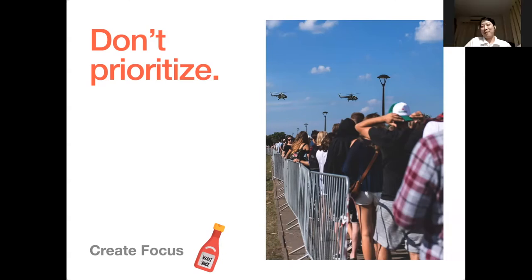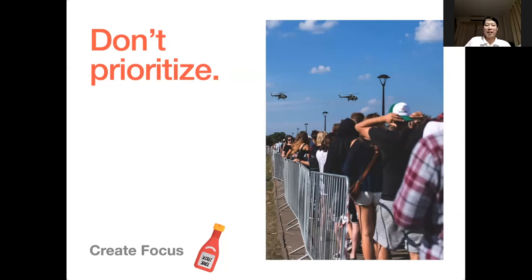Once upon a time I was a scrum master working closely with a product owner who had 200 items on the backlog. I tried to persuade him to remove unimportant items to make it manageable, but he was reluctant — he didn't want to miss something. So one night I snuck in — we were using physical cards for user stories — I snuck in and stole some items from the bottom of the product backlog and threw them away. Several months later, no one had asked about those missing cards. We don't need to keep everything on the backlog; we keep only the important things.